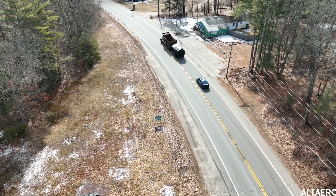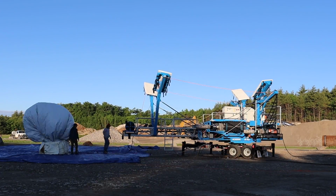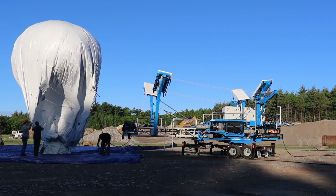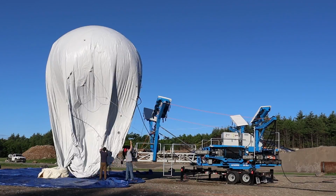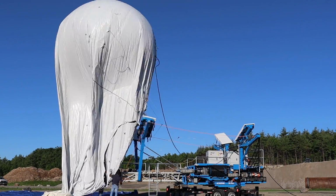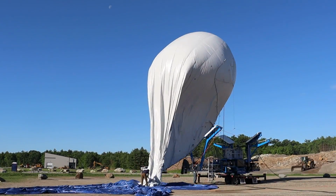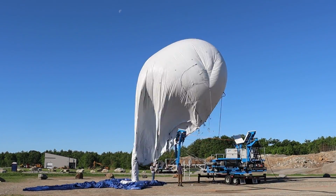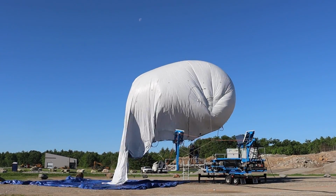So prior to our system being deployed, we would do what we call a site survey and make predetermined locations where we want to set our equipment up. So we deploy with 2 trailers. One we refer to as a set trailer, which is called the set equipment trailer. The other one is our platform. So once those 2 trailers arrive on site, they will be delivered to their predetermined locations that we did during our site survey. And then once they are there, we'll set them up and we'll start deinstalling these trailers and start staging our equipment for integration for assembly.